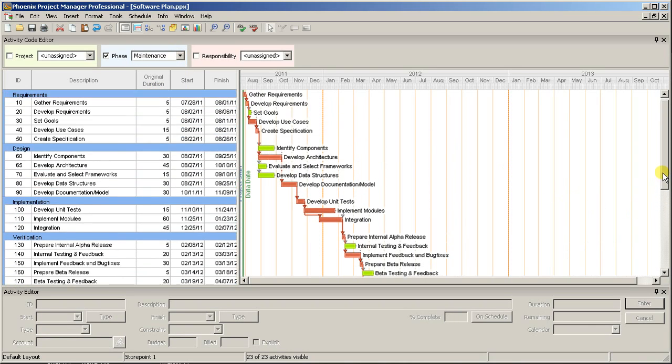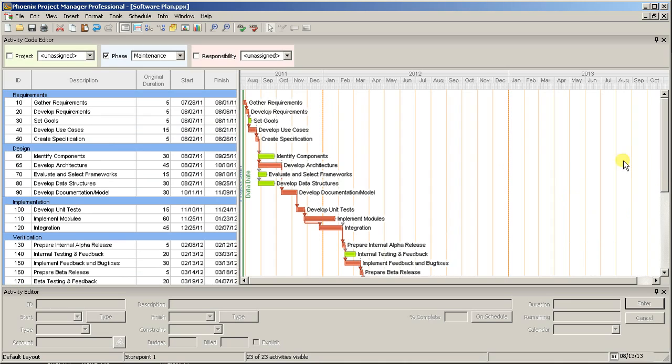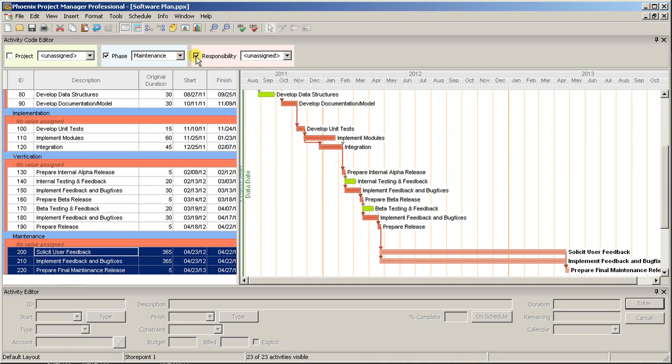Next, we can add another layer to the organization by coding and organizing by the Responsibility Code. Click the checkbox to enable the Responsibility Code, and select the first group of activities that you want to code.